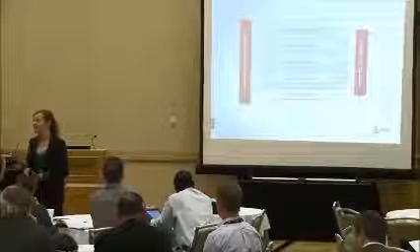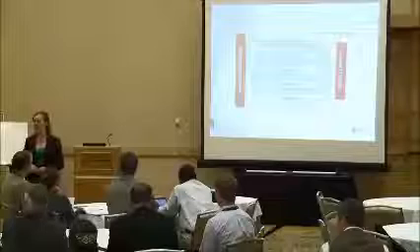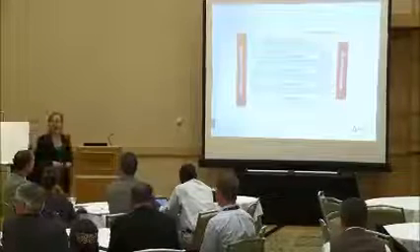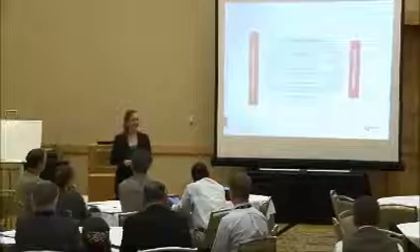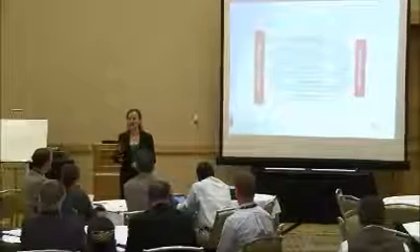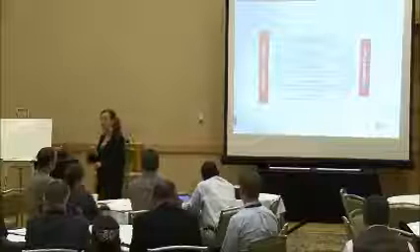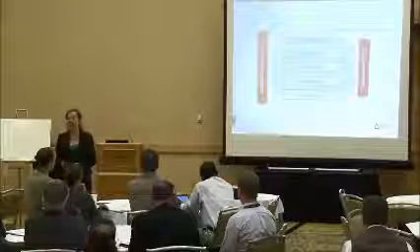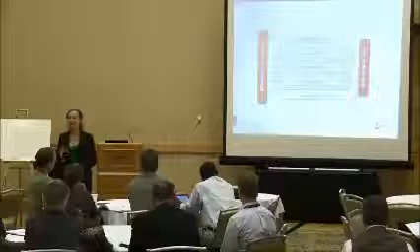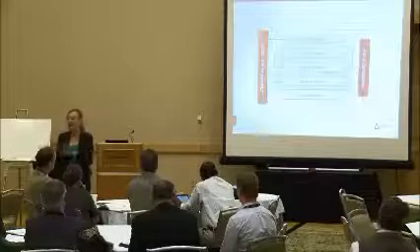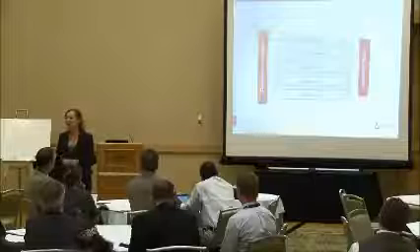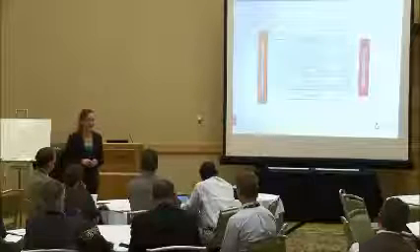Establishing the context. Anyone? Small amount, like 5%, 10%, 20%, maybe? Yep. Is that what we really spend, or what we should spend? Probably what's really spent. Okay, yeah, what's really spent. Anyone else? Okay, when I do risk management planning, on average, I would spend 40% of my time in this step. Okay, so if the activity, task, or function that we're assessing is new and different, and we've never done it before, I could actually spend up to 60% of my time in establishing the context.